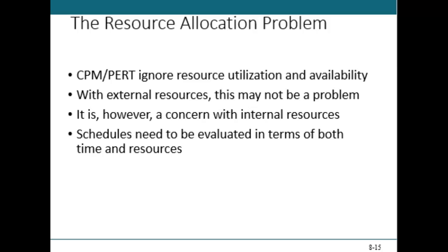One caution that the author included with this book was that CPM or PERT ignore resource utilization and availability. I will just share with you that I think the term ignoring resource utilization is a bit tough, a bit firm. For example, durations are addressed based on the resources available. And any good project manager is always building a resource histogram, a resource bar chart, so they know where the resource is at. Later we talk in normal critical path method, project managers will do resource smoothing or resource leveling.